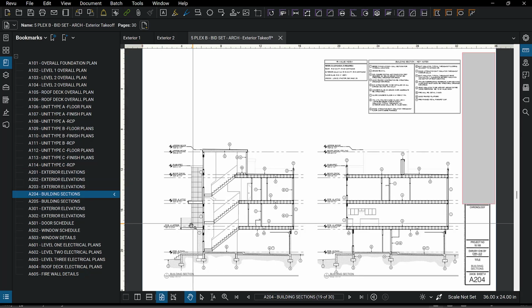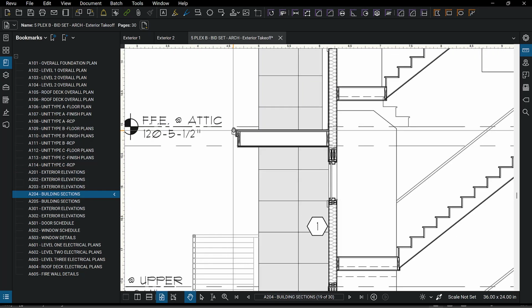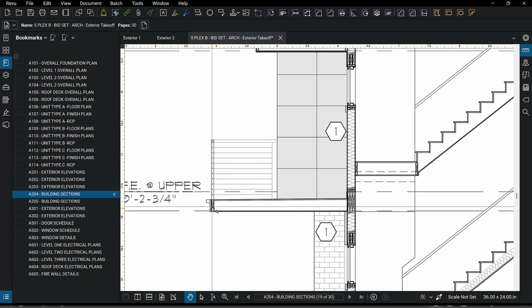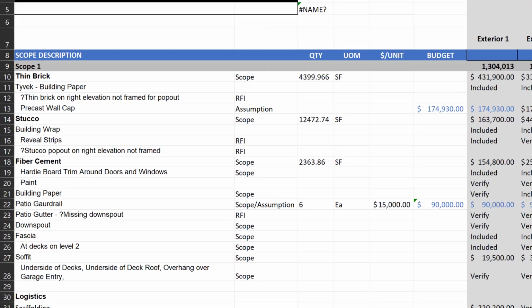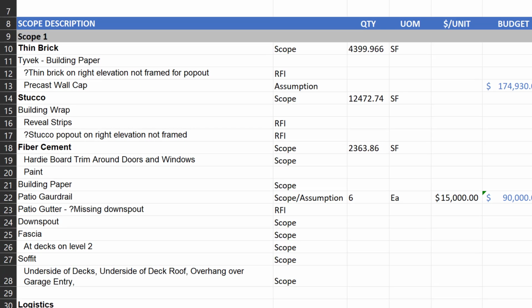Those are elements as part of the scope that we need to have. There's fascia right here, gutter, more gutter, soffit right there, more fascia, soffit. So we didn't do a detailed takeoff to get all that quantity. But as you're doing your main takeoff, you needed to have noted that, hey, those are line items that I'm expecting to see from the subcontractor in their bid.